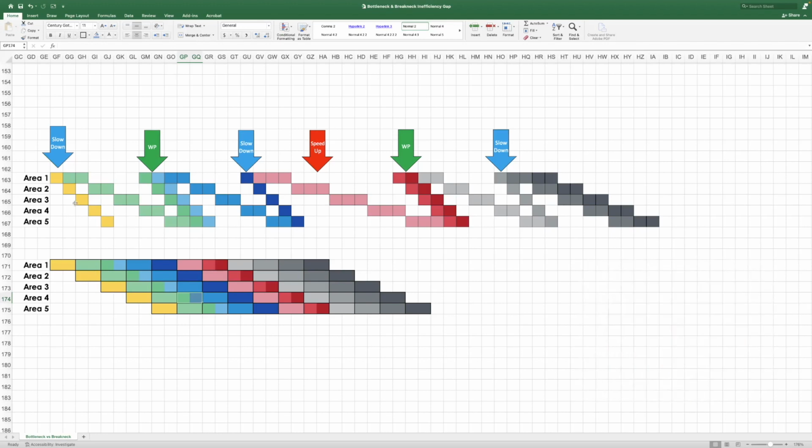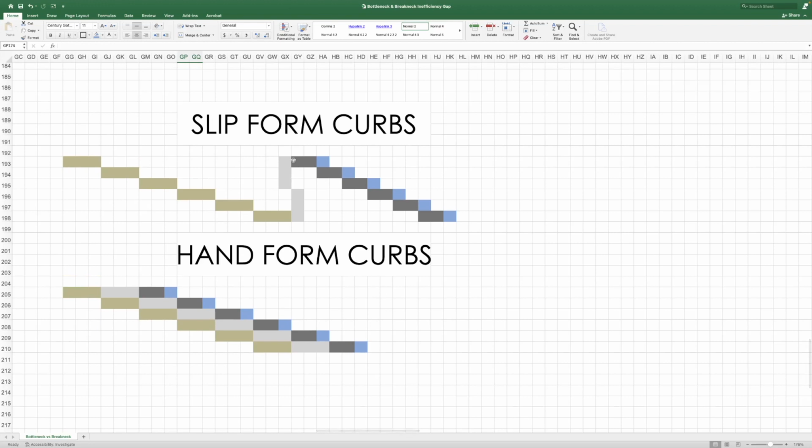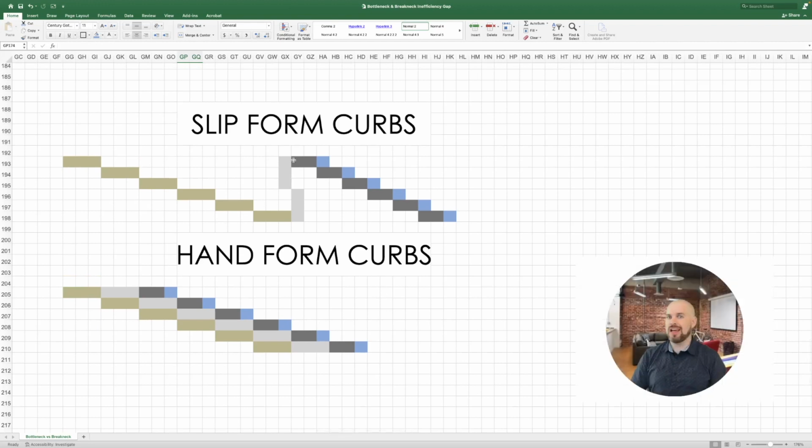I was working with a team, and it was a very, very large site. I want to say a 200-acre site, really big. They had excavation, lots of cut and fill, retaining walls, dewatering, rough grade, all sorts of stuff up front that they wanted to do area by area. And this was the schedule they gave us for large portions of the job site. Okay, we're going to do all the cut and fill in this section. We can balance here. Then we're going to move over here, balance here, move over here, balance it, right? That's how they broke it up into these areas.